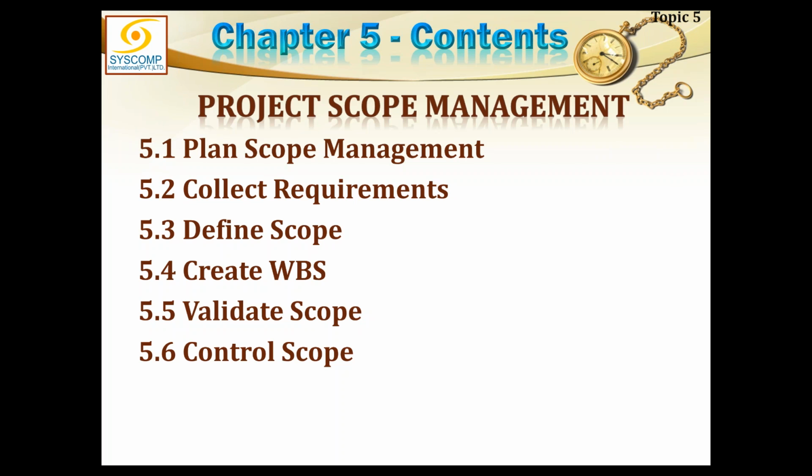The lowest level of our work breakdown structure is the work package, not the activity. Normally people think the lowest level of a work breakdown structure is an activity. I don't have a big objection to that, but generally speaking from the PMI point of view, the WBS is created for the purposes of project management, and the project manager's interest is no more than the work package, because he has to control the project with these work packages.